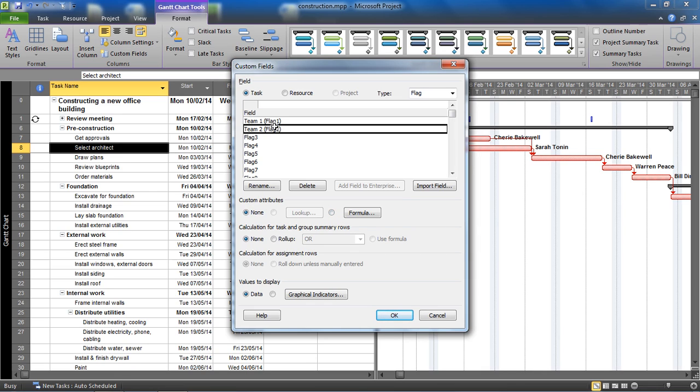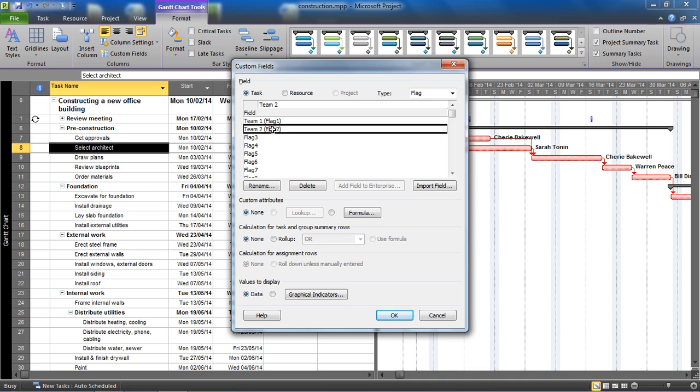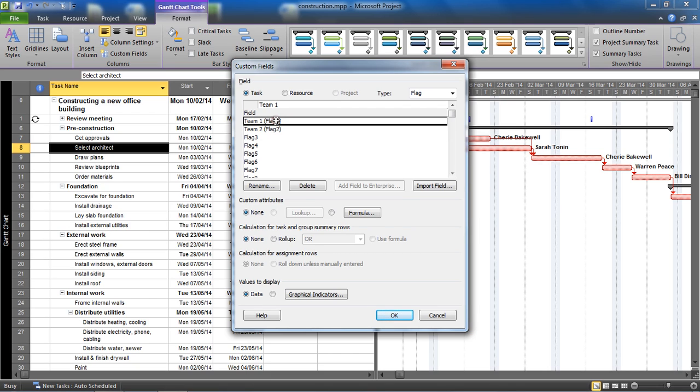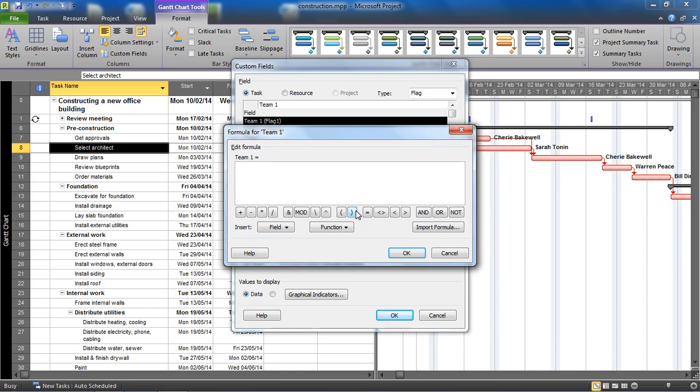Now this is where all the power is coming from really. We need these flag fields to automatically pick up what team member is assigned based on the task. So for this I'm going to select team one, and I'm going to click the formula button to write a formula to automatically change that to yes if a member of team one is on that task. So I'm going to choose this field button.